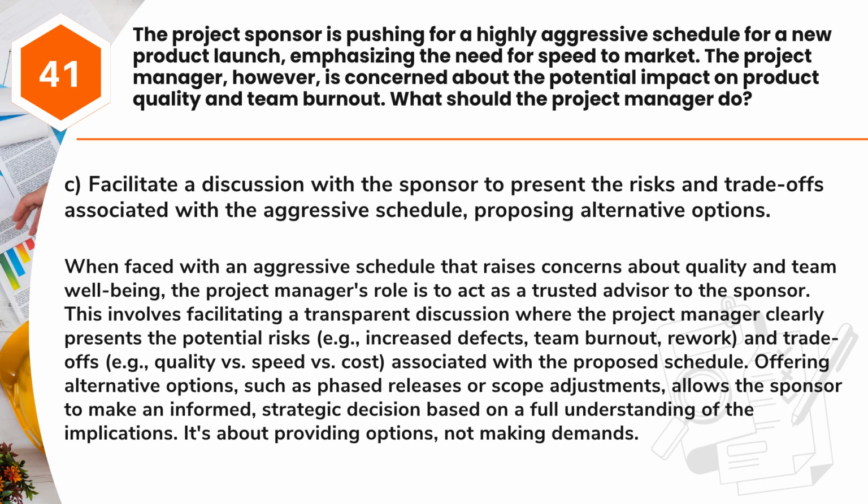This involves facilitating a transparent discussion where the project manager clearly presents the potential risks, e.g., increased defects, team burnout, rework, and trade-offs, e.g., quality versus speed versus cost, associated with the proposed schedule. Offering alternative options, such as phased releases or scope adjustments, allows the sponsor to make an informed, strategic decision based on a full understanding of the implications. It's about providing options, not making demands.